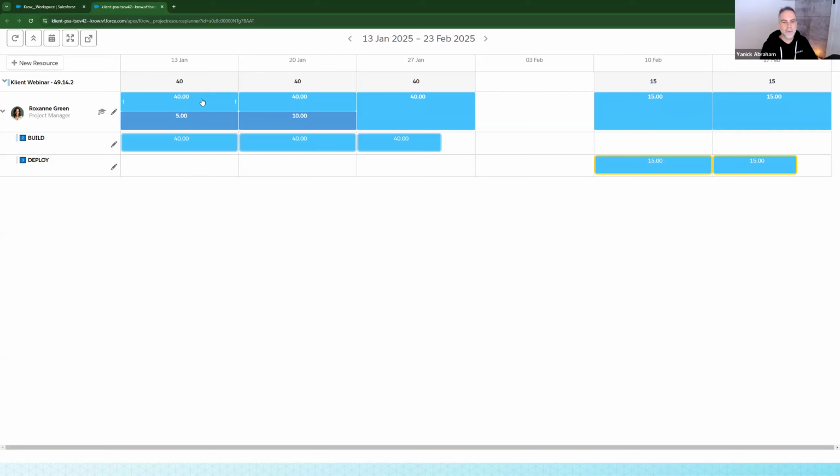And this happens all the time, right? You ask somebody to do something, another emergency comes, I've pushed back, but this creates a delta of 35 hours. Same thing for this week. Roxanne told us as well that she's not working on this tomorrow either. So there's 30 hours that are going to be remaining. So a total of 65 hours still needs to be rescheduled.